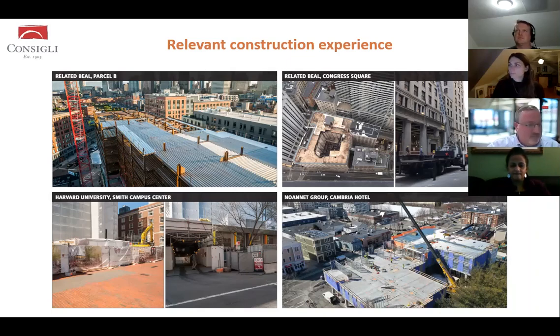For the Jackson Place project, we're going to have a comprehensive construction management plan. First and foremost, as Joe mentioned, is going to include a tree protection plan. Again, not to repeat the things that Joe said, but we're going to be hiring an arborist who's going to come on, and they're going to implement the protection for the trees before, during, and post construction. They're going to be there to monitor, protect, and care for the trees throughout the process.